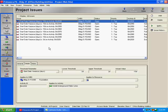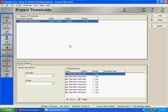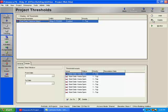If I'm going to click back on the thresholds window, when I decide to discontinue monitoring an issue, I can just change the status to disabled, or I can come over and click the delete button. And when I delete a threshold, all of its issues go away as well.